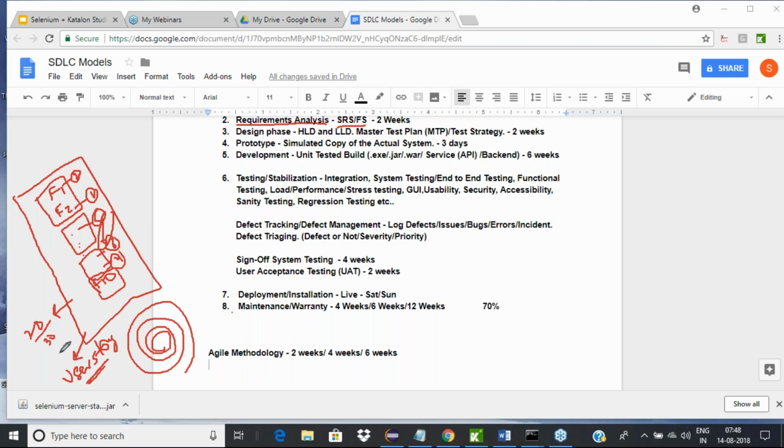So it's explained like a user story, with a description, what is a prerequisite to perform, and ultimately what is the acceptance criteria, when will you accept this as successfully implemented. That kind of user story will be explained for every feature, and each user story will go through requirement analysis, a quick design, if required a prototype, then development, then testing, and UAT and deployment.